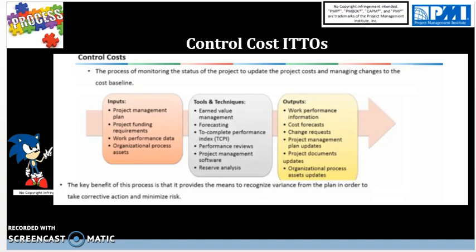We will discuss next. And then we have change requests, because we might have to ask for more money, which is not recommended after having a baseline in place, but in extenuating circumstances, a change request would be raised and would go to perform integrated change control to be approved or rejected, and that is at the discretion of the sponsor.